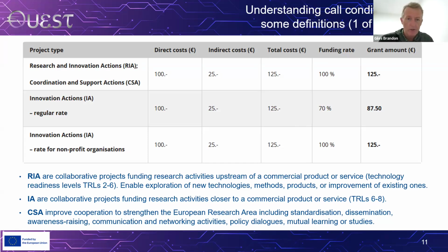Direct costs are the costs associated with any kind of activity or material that directly supports your project. Most of the time, direct costs are personnel costs, costs of paying for researchers to do things for the projects. But direct costs can also be, for example, the purchase of research consumables because they're doing something in the laboratory. It can also be the purchase of new equipment for the projects. It can be travel costs so that researchers can go to consortium meetings, and so on and so forth.